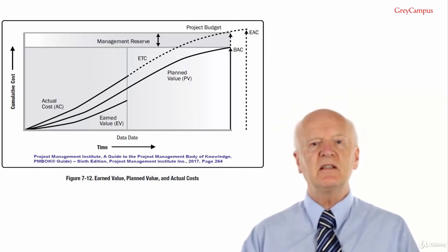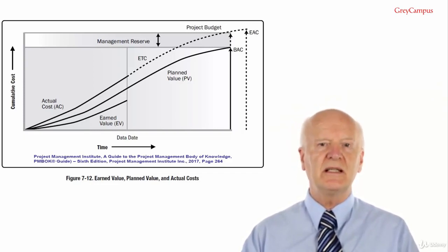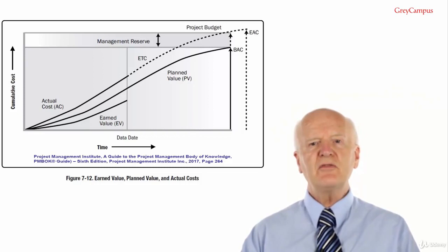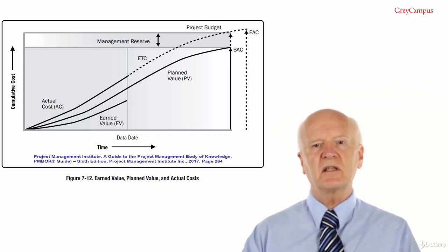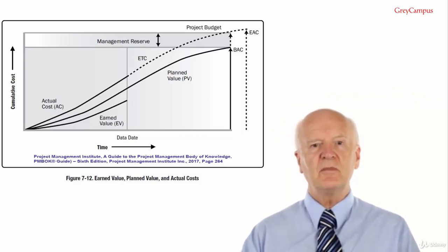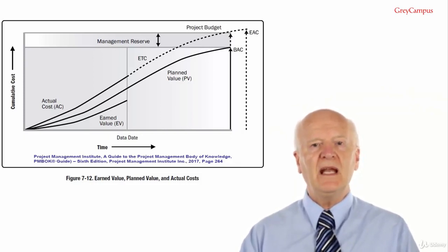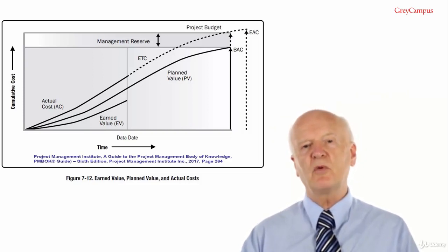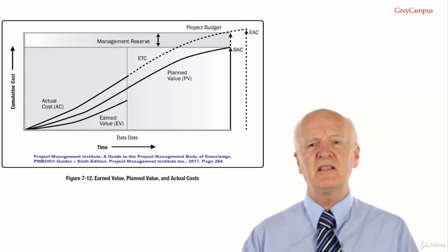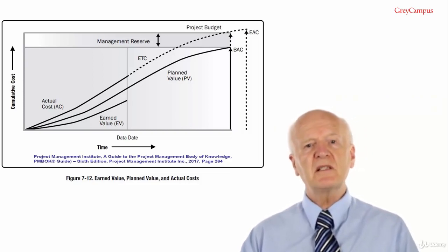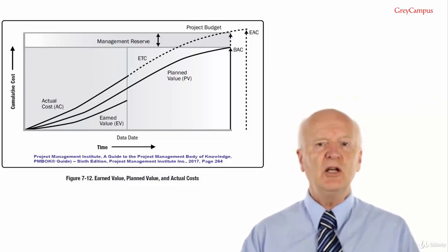The project team can develop an estimated completion EAC forecast. If this forecast is proven to be significantly different from the budgeted completion, then the project manager should consider using the EAC instead of the BAC. That's an important one for the exam too. If this is the case, then the other baselines may require revision as well, because something is basically wrong and the baselines need to reflect reality.